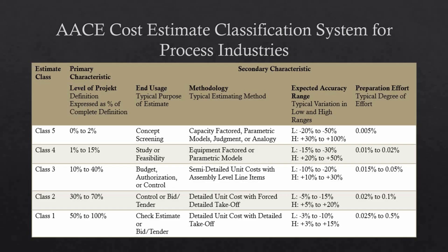A Class 5 cost estimate is conducted in the very early stages during concept screening, whereas a Class 1 cost estimate is performed at the almost final design stage. Classes 5 and 4 rely on rough estimation methods, whereas Classes 3, 2, and 1 use detailed approaches. Class 5 estimates have a wide accuracy range while Class 1 estimates fall within a narrow range. The lower the class number, the higher the estimate accuracy. More detailed estimates require greater effort; Class 5 demands minimal effort whereas Class 1 involves significant work.